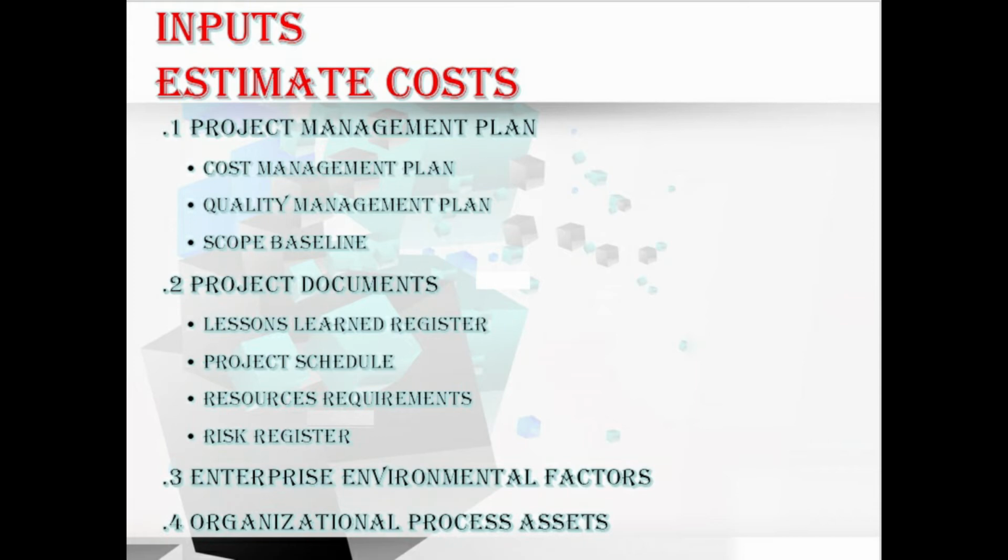Let's move to the next input, EEF, enterprise environmental factors, which consist of market conditions, published commercial information, and exchange rates and inflation. Market conditions here describe what products, services, and results are available in the market, from whom, and under what terms and conditions. Coming to the published commercial information, here resource cost rate information and published seller price lists are available, by which we can track the skills and human resource costs and obtain a standard cost for material and equipment.